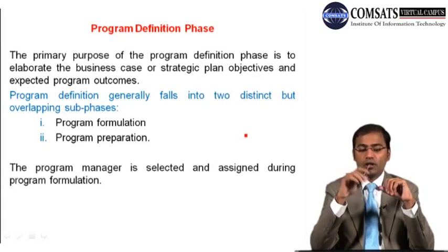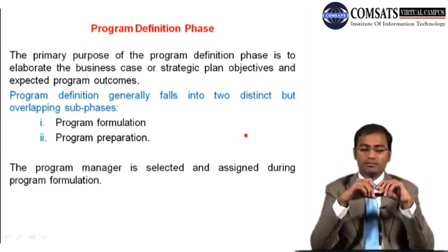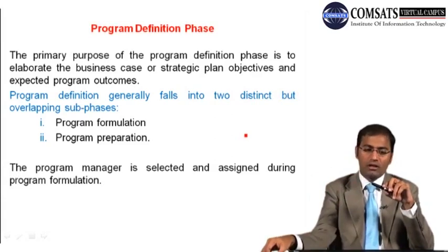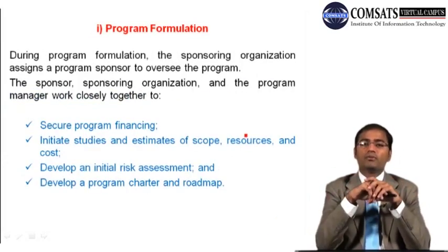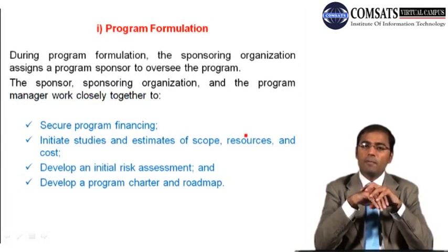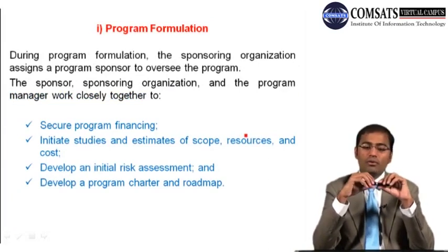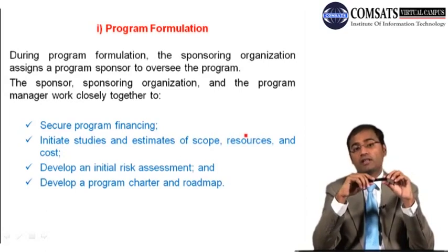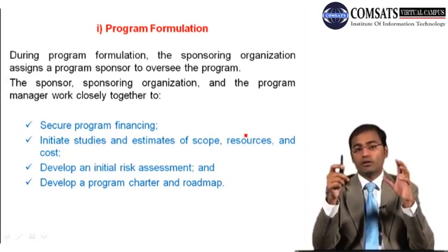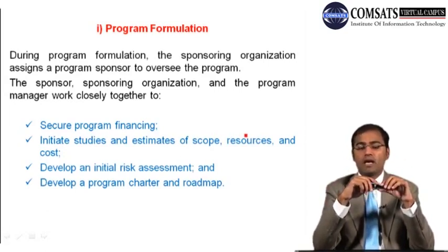And a very important thing is that the program manager is selected and assigned during program formulation, the first subphase of the program definition phase. So during program formulation, the sponsoring organization assigns a program sponsor to oversee the program, and this sponsor then defines a lot of things and selects a program manager.